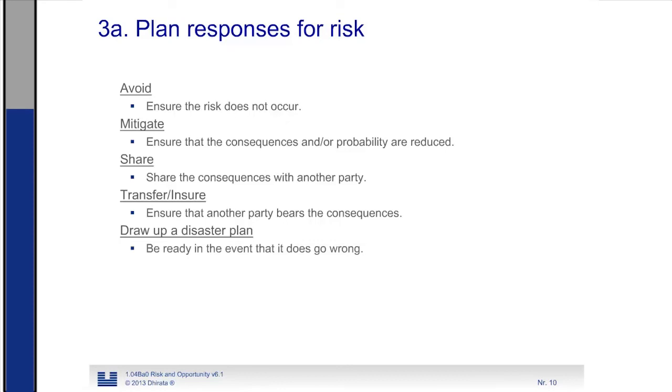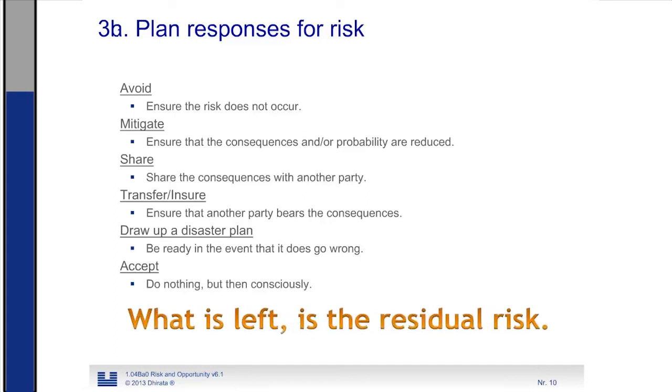Then we can draw up a disaster plan so that we are ready in the event that something is happening. In fact, we are accepting the risk as is, but we think about what we are going to do when the risk really occurs so that we don't have to invent or to develop a recovery plan when it really happens because it's already developed at the start of the project. Finally, we could do nothing, but we take a conscious decision that we accept a specific risk. This is the category of acceptance. And if we are going to do this with all these risks that came out of the quantitative analysis, then it's impossible to get a zero risk. So we always have a so-called residual risk on the project after that we have developed and implemented all our risk responses.